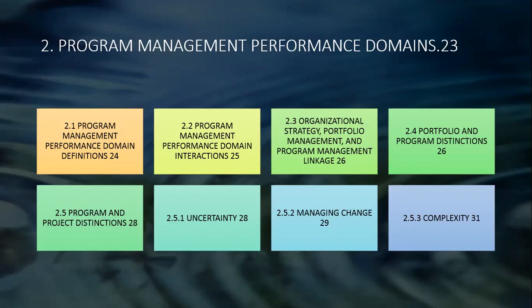Change within a project affects the defined deliverables at the tactical level, whereas change within a program affects the delivery of the intended benefits at the strategic level. Of course, a lot more visibility and a lot more weight. So managing change within the program requires strategic insight, understanding of the program's objectives and intended benefits. Change to any component within a program may have a direct impact on the delivery of the other related components. It's a bit of a trickier game in the world of programs. That's why, for this certification called the PGMP, they go from end to end to make sure you are truly solid. This is definitely not one of those cakewalk certifications.